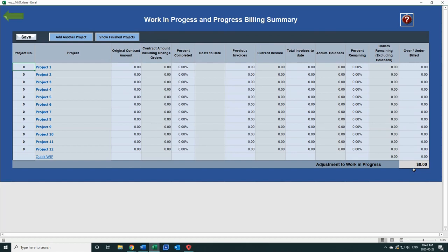Remember, anything you overbilled, it's not your money, it's still your client's money. Theoretically, possession is 9/10 of the law. I know, I understand that, but it is still theoretically and legally your client's money, like a deposit. Well, we don't pay tax on deposits, and hence we shouldn't be paying tax on overbilling.